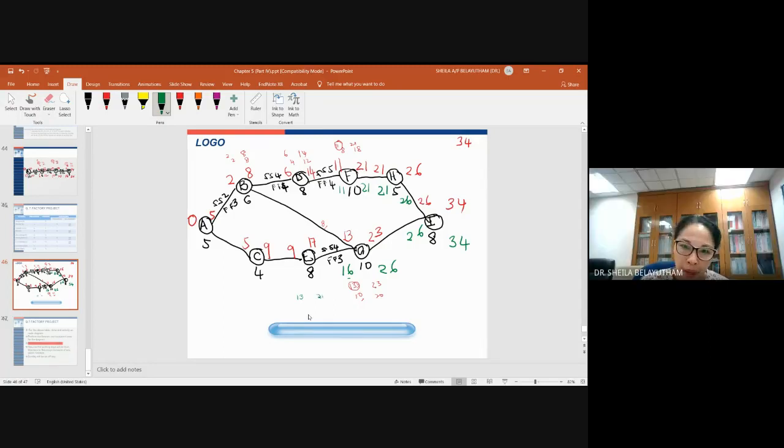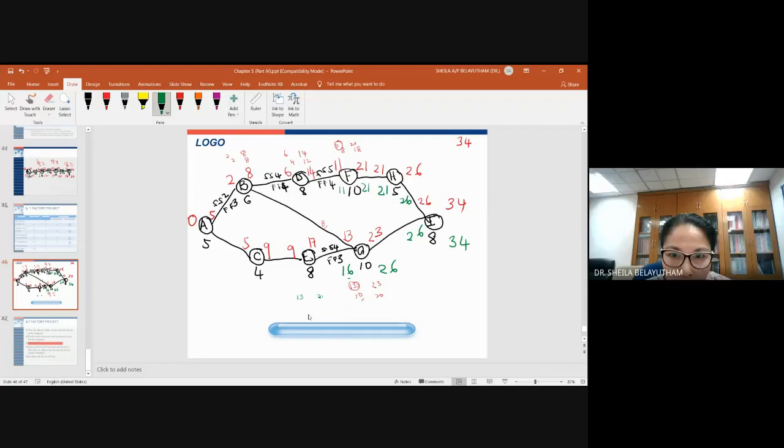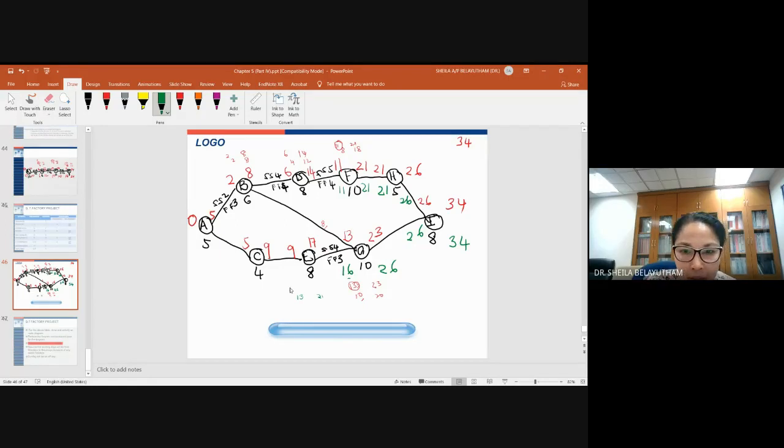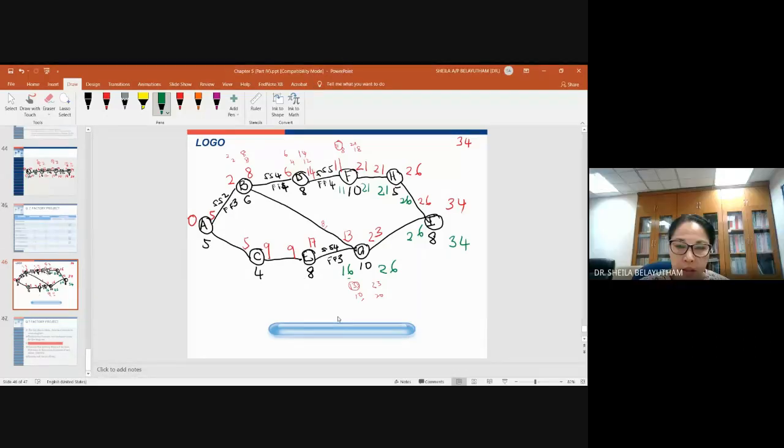No, start to start 4, coming back. Doctor, it's 4, right? 16 minus 4. Right? Oh yes, so 12. 16 minus 4 is 12, right? Right, doctor. Thank you. So 12. Start to start 4, so 16 minus 4, 12. So 12 plus 8, 20.